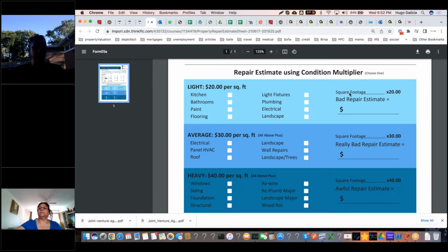to touch every single system, because it's not only the expense of labor and material, but keep in mind that you're going to need to work with all kinds of inspectors from the village, all kinds of permits. You're going to need permits for overall remodeling, roof, windows, HVAC, electric, plumbing, fences. So you're going to be opening up all kinds of worms, so, a can of worms. So just be aware of it. Right now, be cautious if you're going to take on gut rehabs.